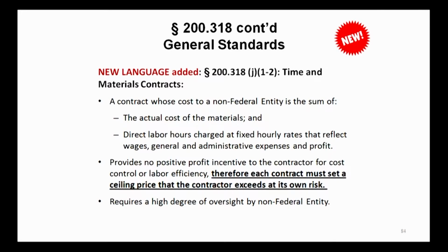in their completion of the project, because they're paid on a fixed hourly rate, including profit, plus their actual cost of materials. So one might be concerned about a contractor with such a contract drawing out that work as long as possible because it gives him an ongoing cash flow.